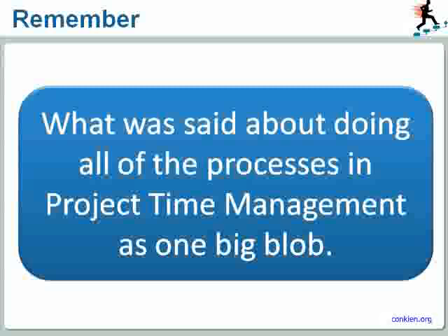And usually, as I do this, I personally have a hard time not to go ahead and also define the predecessors and successors at the same time, because it's so obvious that I first have to mix the concrete, which takes 2 hours, then I have to pour the concrete, that takes 1 hour, and then I have to let it cure, which takes 2 days. But doing all of that is not part of estimate activity durations. That's why we don't look at this as one big blob. It's part of our next process, develop schedule.